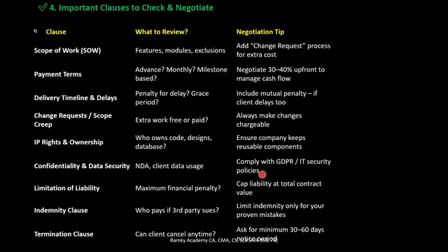And next, moving on, limitation of liability, which is very, very critical and important, because if something goes wrong from the supplier side, or from the customer side, each party has to agree to the limitation of liability, because any kind of liability will be fixed at a maximum of 12 months fee payable, right?